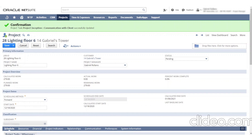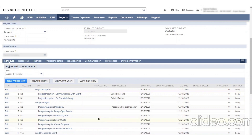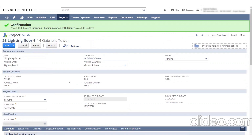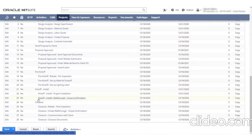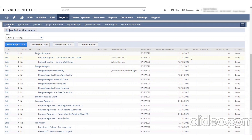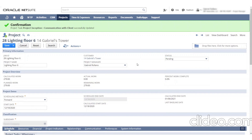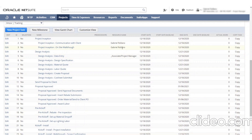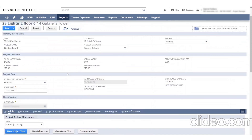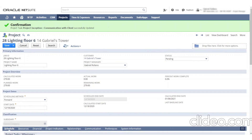Hope this helps. We can dive more into this — this is just the first round. We still have to set these predecessors so we can get the Gantt chart looking right, and we also have to get the proper mapping of the resource name. But this is the current progress. This will allow them to update and create projects on location sites with this common template, and just one person is going to have to go in and update who it's actually assigned to once the project is awarded. You'll also need to update the start dates and fill in the predecessors. I hope this helps — looking forward to talking more. Thank you.